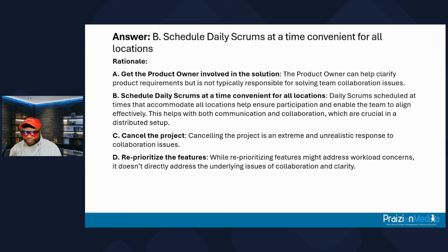Okay. So daily scrums are a sync point for the team members. It's also a vehicle for daily socialization where behaviors can be observed and trust can be built. So we want to, as much as possible, ensure that the team syncs up. Remember the use of the daily scrum. The daily scrum is not for management, and the PMI makes it very clear that we should not look at the daily scrum as a status meeting. In fact, that's a recipe for getting questions on the daily scrum wrong. So I want to keep that in mind. Okay. All right. Let's go to our next question.